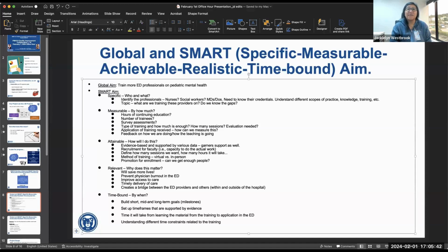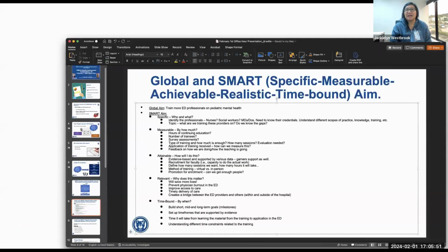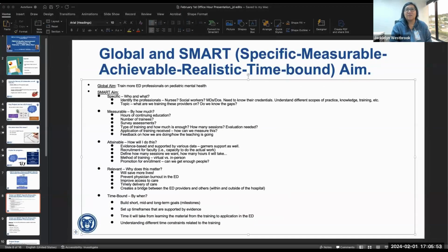It's everything before it. And I speak from current experience, that's one of our biggest setbacks right now. What we would like to take 6 months to implement, on paper looks fabulous, but it takes about 1.5 years. So being realistic, that training is going to be stretched because of where we are and how we tap into those evidence-based resources.